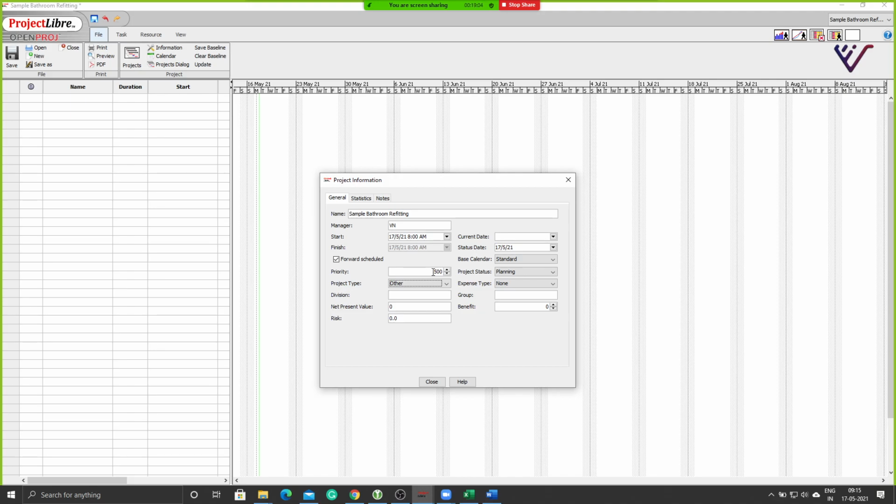We apply conditions and constraints to all the different activities. We will come to that when we are doing conditions and criteria. The program will also look at which one to give priority over the other when it comes to resource leveling. That's why I said we will look at it when we're doing resource leveling. So when you have resources assigned to the project and you assign them different tasks, it will decide based on the priority of the task how many resources get assigned to that or which one needs to be done first.